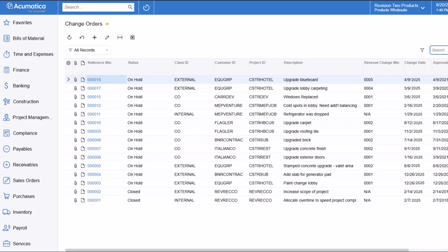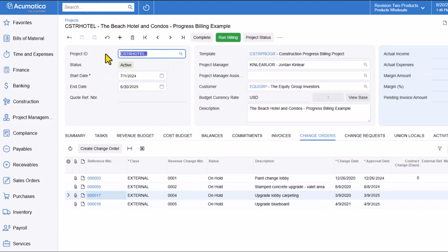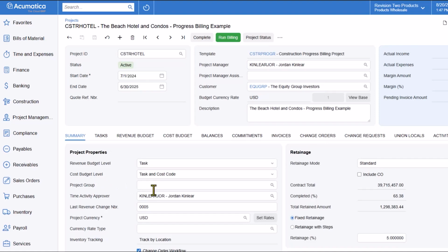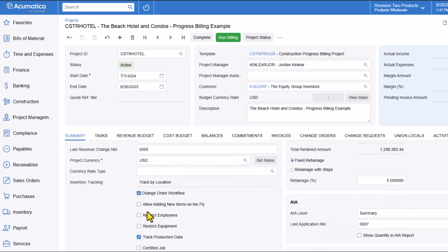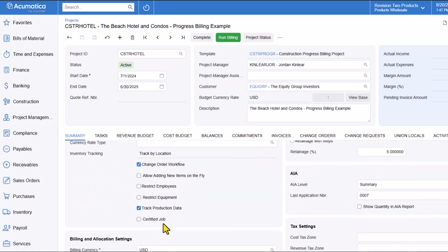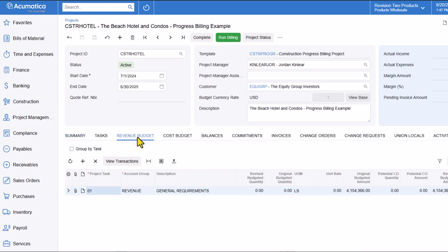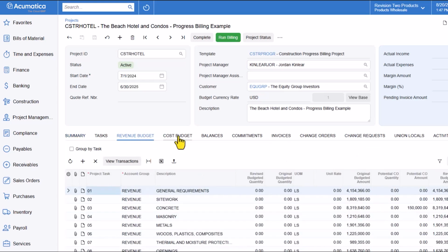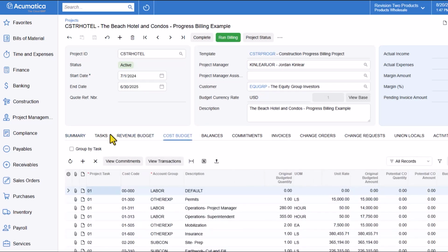Like change requests, we can view all the change orders at a glance and drill down to review supporting information. Attach supporting documents and see them at a glance in this list. Set up rules to apply changes to specific project areas with change order classes. Automated cost tracking and budget updates help manage the financial impact of change orders to avoid cost overruns.